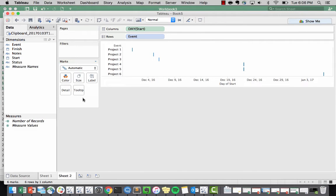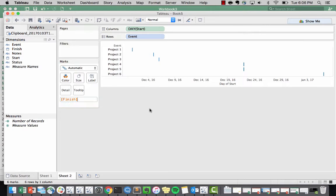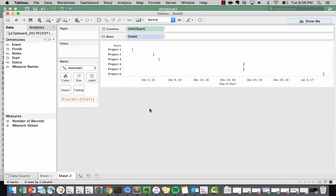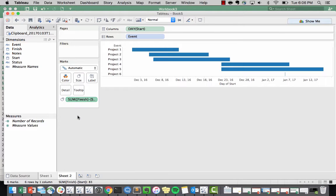Now here's the tricky part. You can make a calculated field but I'm going to do it in the marks. I'm going to create a finish minus start and this is going to be, as you might guess, my size. So just like that you're able to create a very quick Gantt chart.